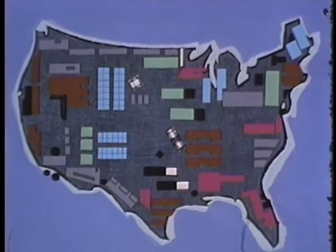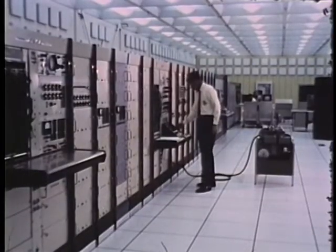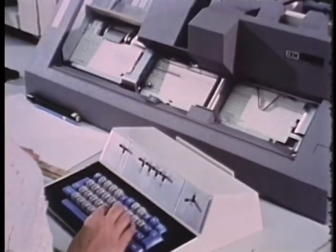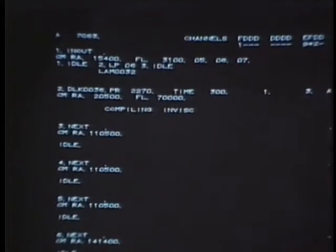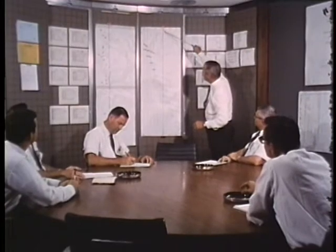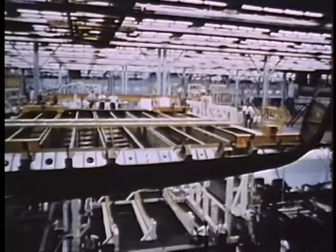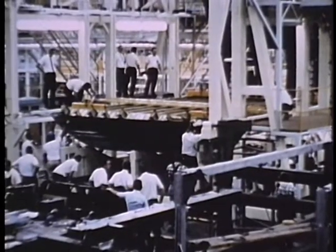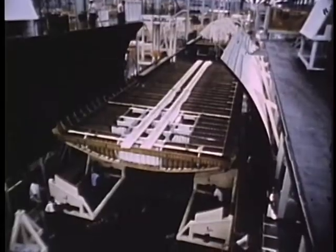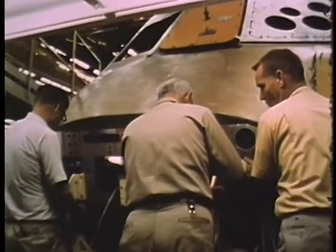As the massive project moves forward in the subcontractors' plants, a special computer system at Lockheed digests hourly inputs from all across the nation. Any test that fails, any scheduled drift, any design shift, any shortage. Project managers are advised of trouble immediately and can take action before it grows. And production hits a peak of activity. Finished components flow in an increasing stream from the plants of suppliers to Lockheed, where the giant aircraft gradually takes shape.